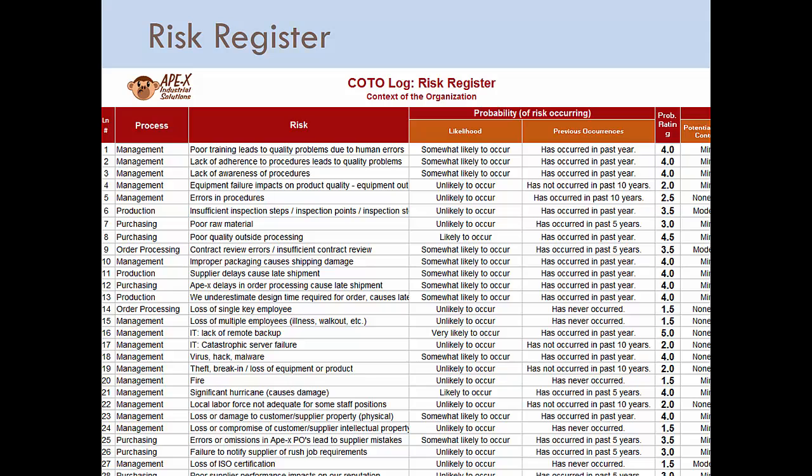Right? So because the auditors are going to demand it, because some of your customers might anyway, let's go ahead and put it in. Let's give them the risk register they want. However, I'm going to tell you to only use it when it's appropriate. So if you remember back in the issues log, some of the risks that we identified on the issues tab, we determined we're going to apply the risk register to. Those would then be carried over here onto this next tab called the risk register. The other ones would not. So not all your risks are going to get on here.